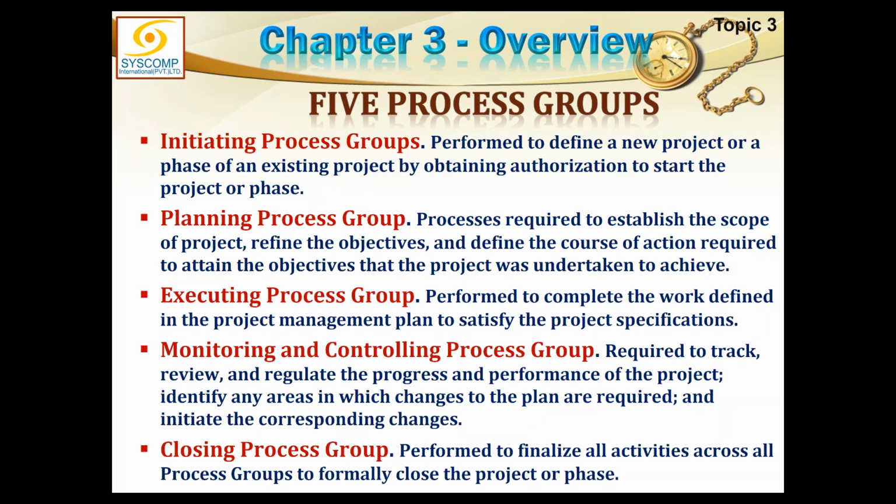Once a change request is approved, the project management plan is amended accordingly and it is sent back to execution so that they know what changes have been made, what is the new shape of the project management plan, and what they are going to perform in the remaining portion of the project.